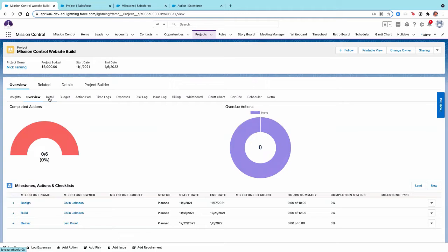We've updated the project billing information, updated the milestone owners, and this time I didn't put a milestone budget, but say for instance I didn't populate that invoice amount field on the milestone, then that would be based off of the milestone budget. Or if this field isn't populated as well as the invoice amount, then you can also bill on the hour schedule.